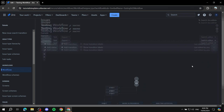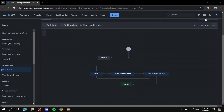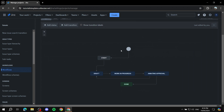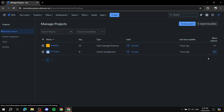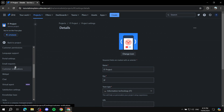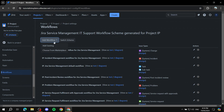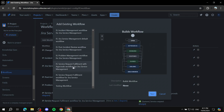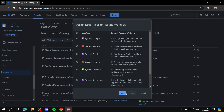To apply your workflow, exit the editor once you're done. Go to Settings in the top right, then Projects. Select the project you want to apply it to — note that newer generation projects may not have this option, but classical ones do. Click on Project Settings, go to Workflows in the left menu, click Add Workflow, then Add Existing. Find the workflow you just created — Testing Workflow — click Next, select the issue types you want to apply it to, and click Finish.